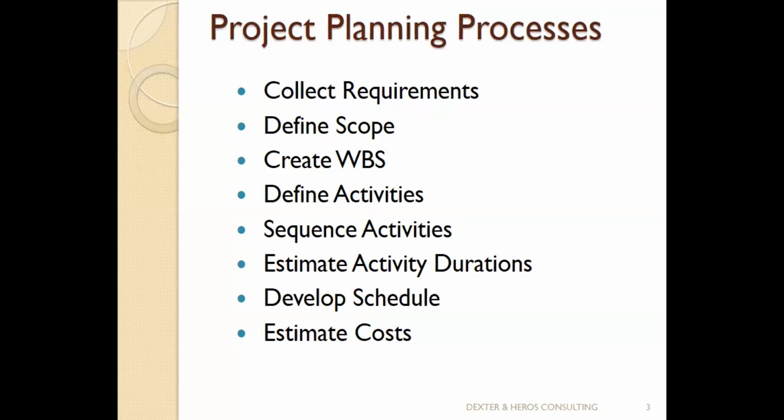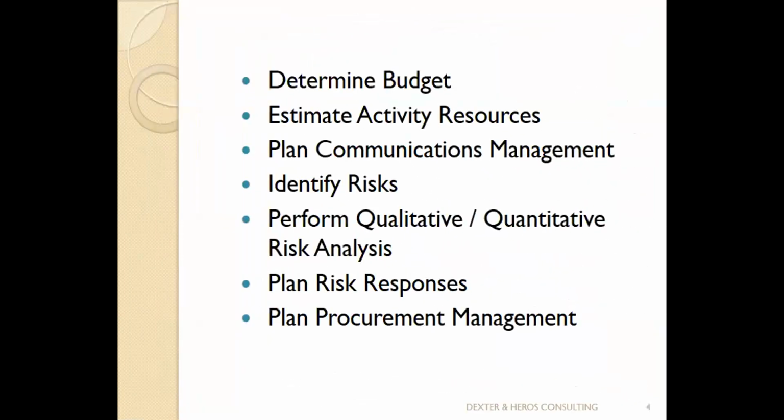So we estimate cost. And of course, we determine budget. It's a very simple process that involves, if you say this one will cost 10 naira, this will cost 20, this will cost 5 naira, and so on for the activities. Determine budget means get the total of the estimates. Budget is just a single figure. So you hear Nigeria as a country say our budget for 2024 is so many trillion, just a figure. But before we arrive at that budget, there would have been estimates, which is what we refer to as activity estimates.